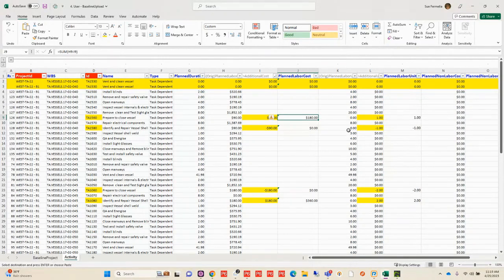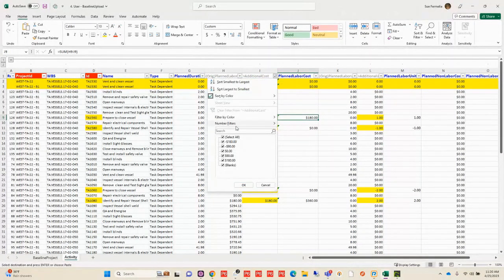Now, in this case, I'm showing all of my activities in this particular baseline. However, I'm only changing a handful. So what I would probably want to do is just load the ones that still have changes, and remove the ones that didn't have any changes left. So I could save just these lines and then use that to load into my project. It's going to be a little bit simpler, a few less points when we're talking about loading this back in. So I'm going to go ahead and load that baseline update.